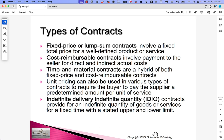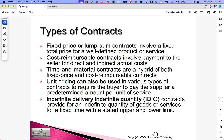When buying from outside, you don't always use the same kind of contract. Contract types include: fixed price or lump sum (a fixed total price for a well-defined product or service — sometimes problematic for custom software development because it's hard to define well), cost reimbursable (payment to the seller for direct and indirect actual costs), time and materials (a hybrid of fixed price and cost reimbursable), and unit pricing (requiring the buyer to pay a predetermined amount per unit of service — for example, $25 per insurance claim).